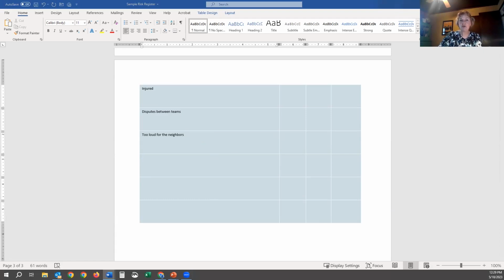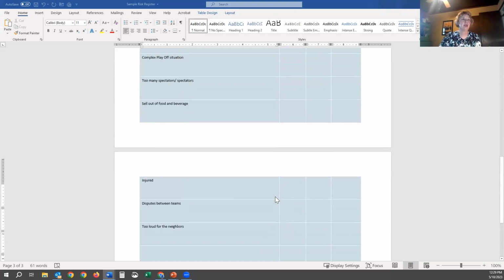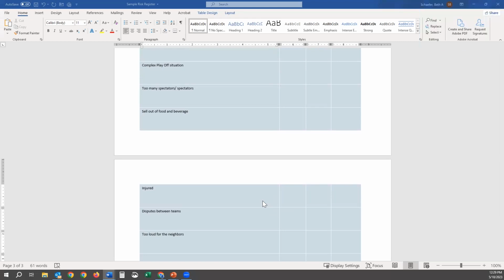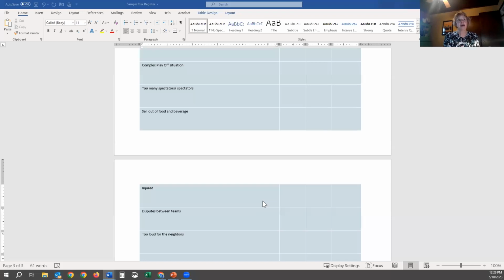All right, another question to get us to think beyond functional logistics. If we're in the workplace and we're thinking about social risks, we might be thinking about things like, in order for my team to execute this, we're going to have to work with this team over here. That team over there is missing 2 or 3 people right now, and so that may slow down our process. So that's a social logistic.